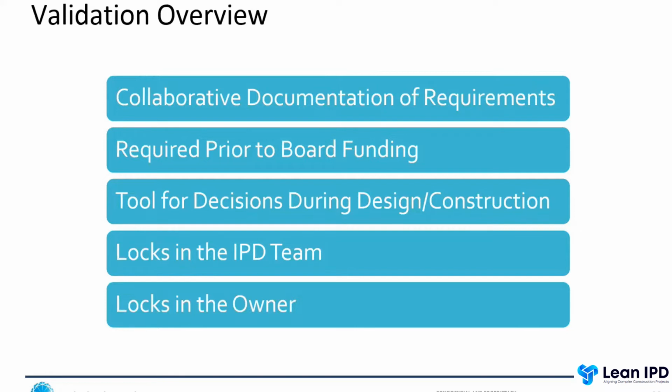And we do this, we really have one main stage gate within these projects. Before we went to this type of model, we used to do a stage gate at multiple increments throughout design. So we would do a schematic design, a design development, and then a construction document stage gate. And pretty much 100% of the time, we had a massive cost increase between those design milestones, and we had to go back and do rework.